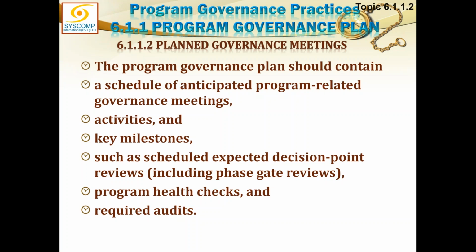But at any point when you do the health check, you take an X-ray of whatever is happening, analyze it, and create your own performance report out of it. This is not exactly the performance report submitted by the program manager. Any other required audits are also part of it. So a health check is a type of audit.